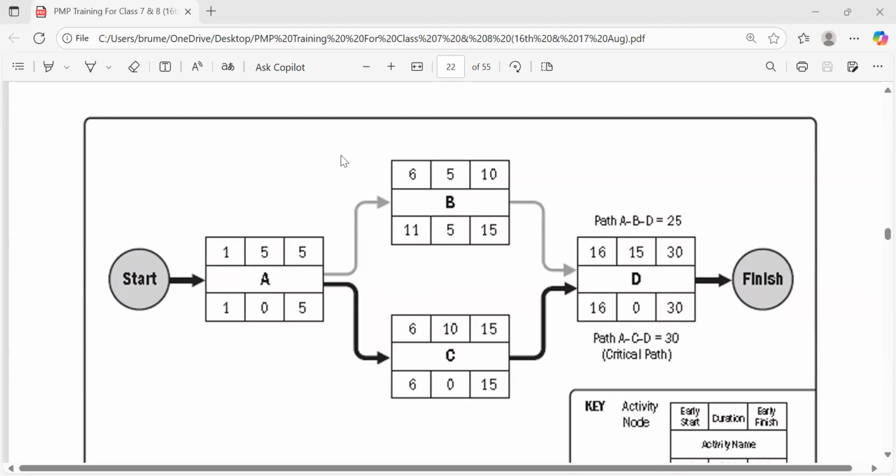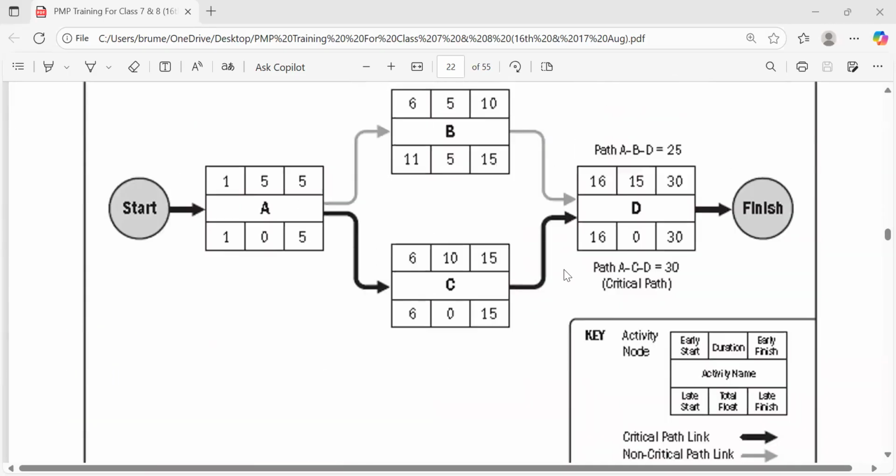There is no way plastering and painting can happen at the same time. Is it possible? No. We must plaster and wait for it to dry up before we paint. So these activities on the critical path cannot be done that way. We can only crash them. That's why fast tracking is risky. It's riskier than crashing. But I only use that illustration to explain what fast tracking is.